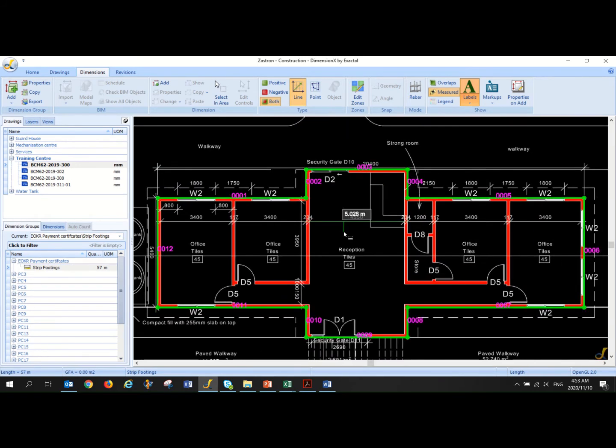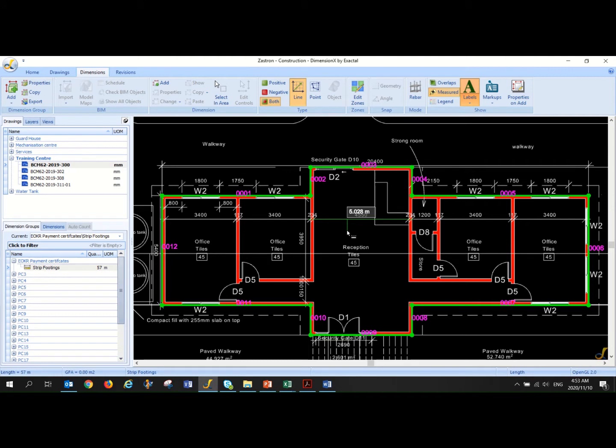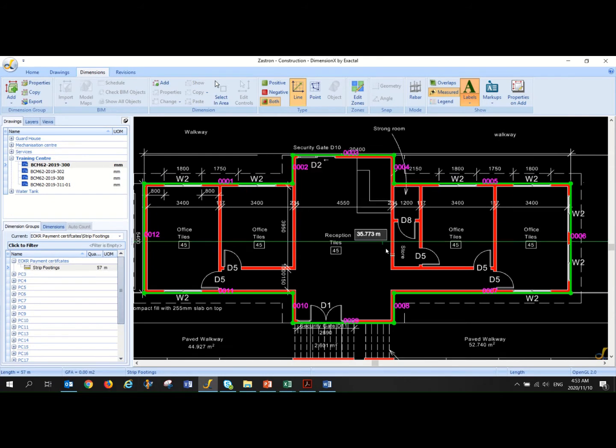So now what we can do is we can go to our bill of quantities and see how much actually has been measured, and then calculate the percentage of work actually done. So in the next little section we'll actually look at that. So this is typically what the QS does. He goes to site and he measures all the work, the actual work done. He compares it to what he's measured in the BOQ and calculates the percentage of how much work for that particular item he can actually use. So this is just a very quick introduction to how the percentages are calculated.